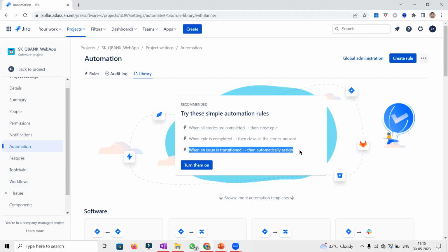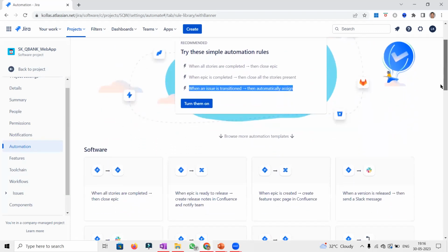The PO needs to review and give the sign off. To showcase that status, some of our teams created a rule so that as soon as the story is done, it gets assigned to the PO. It is up to the teams to figure out which rule they want to make use of, based on the context.